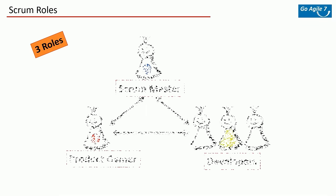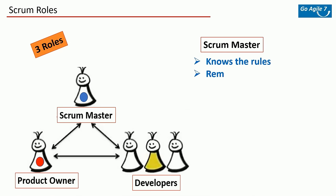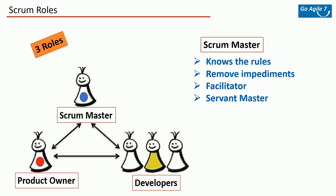In Scrum there are only three types of roles: Product Owner, Scrum Master, and Developers. The Scrum Master knows all the rules of the game and closely monitors any impediments — blockers. To remove impediments they coordinate with other teams and departments like legal, finance, and admin, as well as release management and external business stakeholders. Scrum Masters facilitate any required meetings and are like the spokesperson for the team.